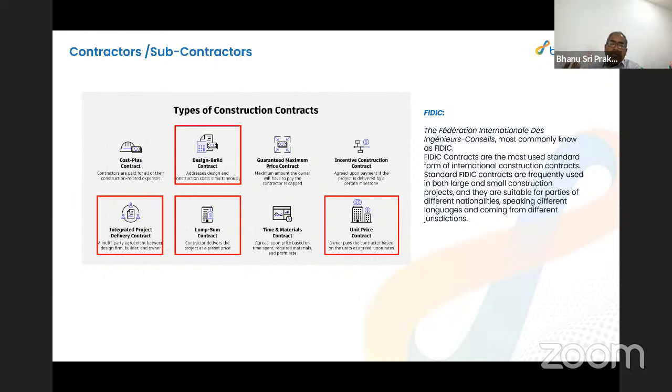Without even completing the drawings, with so many errors in the drawing, they have completed even 3 levels of basement. And this is not a small building, it's a 40-story super luxury building. Already the rework in that building has crossed more than 1 crore rupees. So the project is around 1,000 crores. So they may be seeing it as 1%, that's okay.